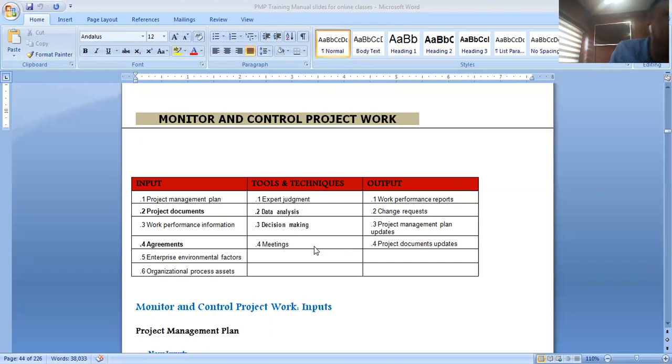And also, if the client wants you to change, the client should put it in writing. And all of you will analyze how much it will cost. And when you come up with how much it will cost, the client should sign that they will credit your account, or they must credit your account. Client cannot just come and tell you change this place and put this place. No, how would the client say that?